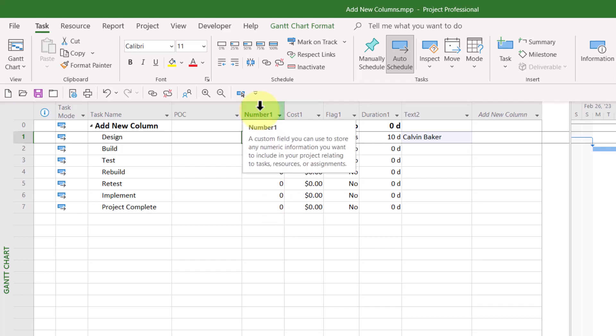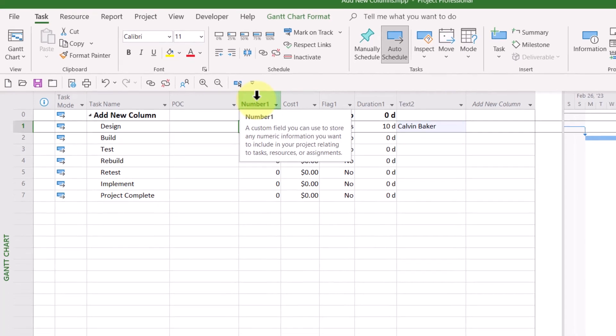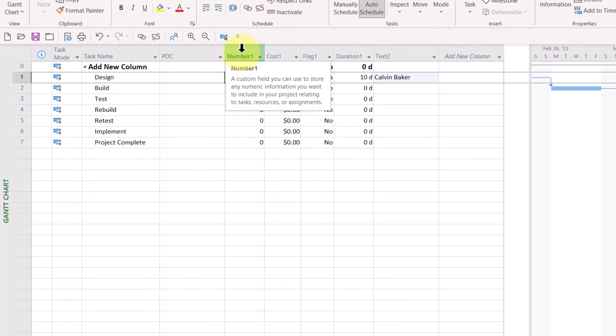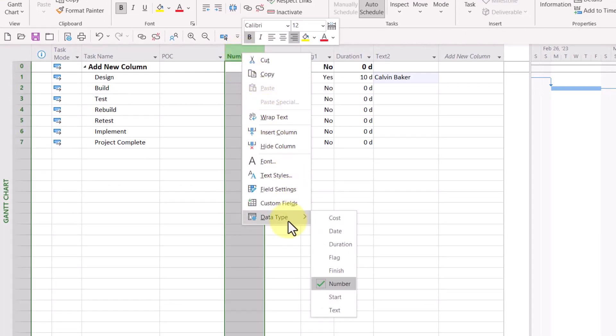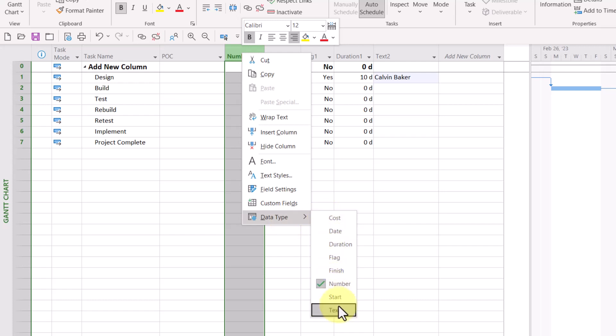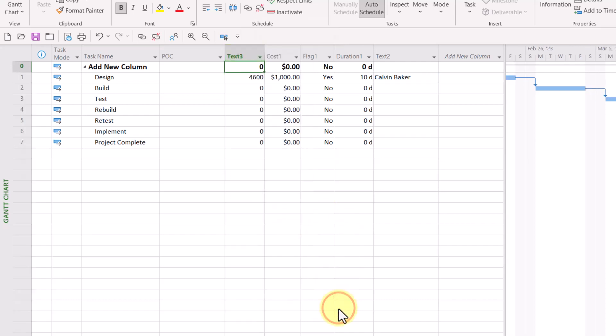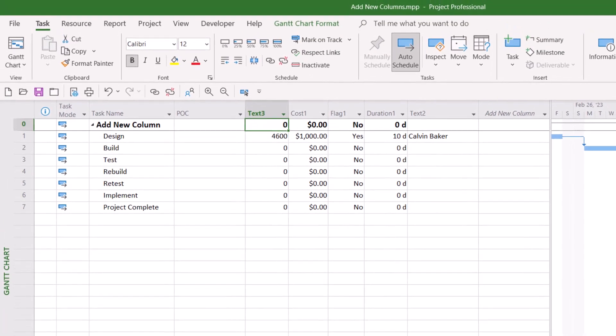It's very easy. Right-click on the column header of the column you want to change. On the shortcut menu, go down to the data type flyout menu and choose the type of data you want. In my case, I want this to be a text field. Notice that Microsoft Project changes this to the first available text field, which in my case now is text three.